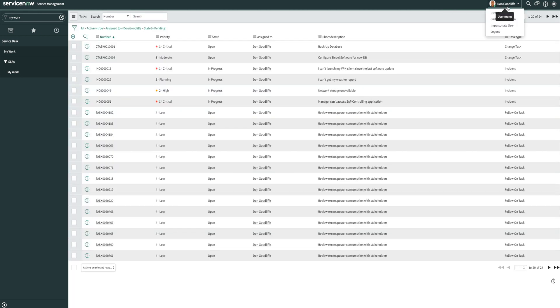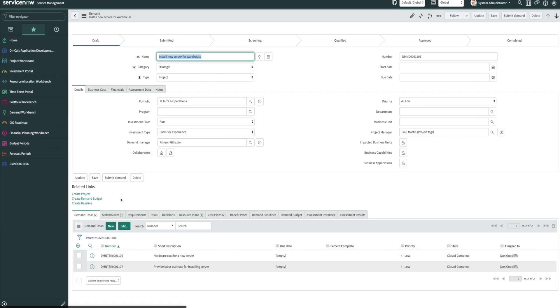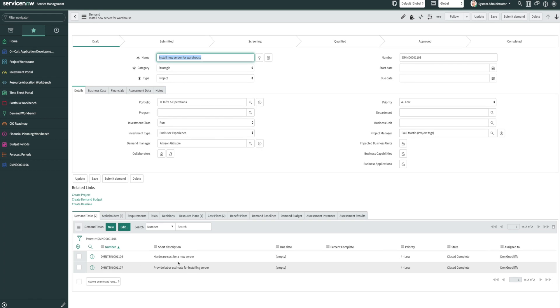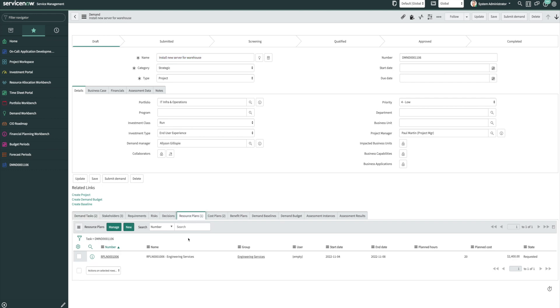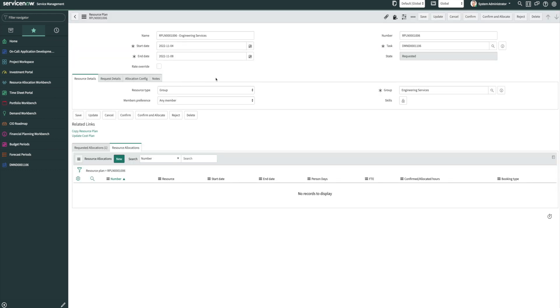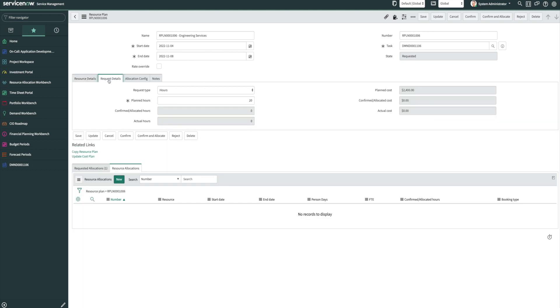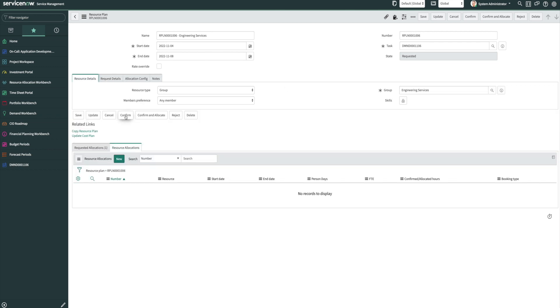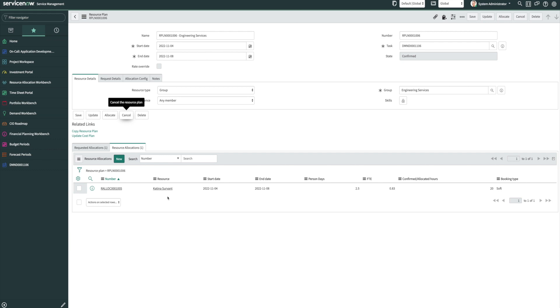Now if we go back as a system administrator who is the demand manager for this particular demand, we can see here both of these tasks have been completed. And we can also see we now have a resource plan that's been generated. So we can see we're looking for someone from engineering services, and we're looking about 20 hours to install with a cost of $2,400. So we can go ahead and confirm that plan, and we'll see we've got a person assigned to it for the 20 hours.